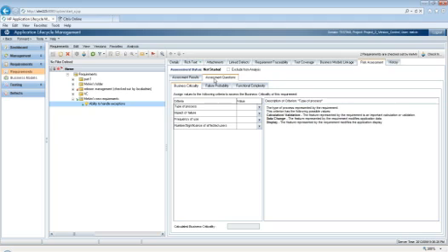These assessment questions are split into 3 different tabs, which is business criticality, failure probability, and functional complexity. It's basically your risk, which is impact times probability, rate of impact times impact probability. The HP team has added functional complexity as well to the whole mix. Unfortunately, I've never used it in real life, but I have used the other 2 tabs, which is business criticality and failure probability. So in this tab, I will just capture what type of process it is, and note that